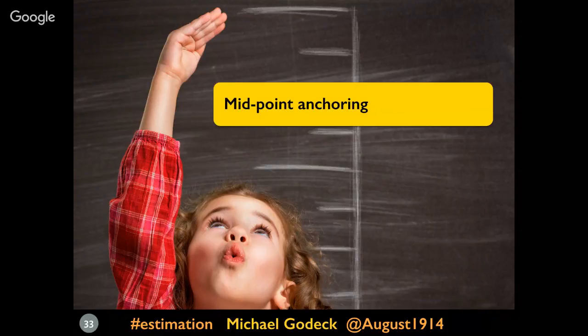So going back to the question of confidence interval, a 90% confidence interval means that there's a 5% chance that the true value could be above the upper bound and a 5% chance that it could be below the lower bound. And so are you 95% certain that the actual value will not fall above the upper bound? You ask that question and then ask the same for the lower bound. Are you 95% confident that the actual value will not fall below the lower bound? So it's a way of revisiting your range estimate before you move on, to test the boundaries independently.